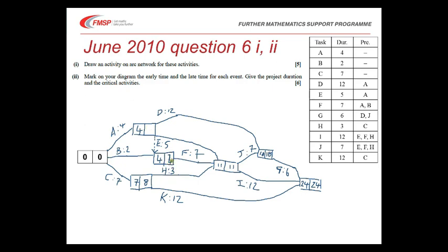And then back into here, 4 minus 0 is 4, or 11 minus 5 is 6, or 18 minus 12 is 6. The smallest of those was 4, and that's the latest we can get there, not run late overall. And finally, back into here, 8 minus 7 is 1, 4 minus 2 is 2, 4 minus 4 is 0, which does get us back to this 0 there.